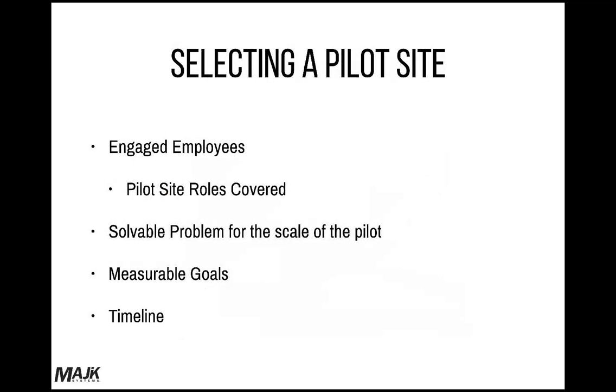So when you're selecting a pilot site, some other considerations I know firsthand are you really want to make sure that there's engaged employees at the pilot site and that you have the roles that we discussed covered for those initial pilots or small scale implementations. You also want to identify a solvable problem for the scale of the pilot. You really don't want to be going into, say, a $5,000 pilot thinking that you're going to solve all your manufacturing problems.